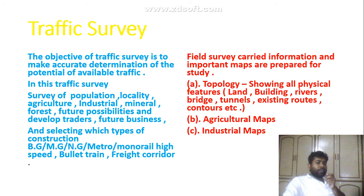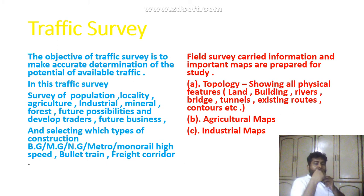The objective of traffic survey is to make a determination of the potential of available traffic. In this traffic survey, surveys of population, locality, agriculture, industrial matters, forest, future possibilities and developed trade, future business are conducted, and it helps in selecting which type of construction — such as broad line, MG, NG, metro, monorail, high speed, bullet train, or freight corridor — is appropriate.